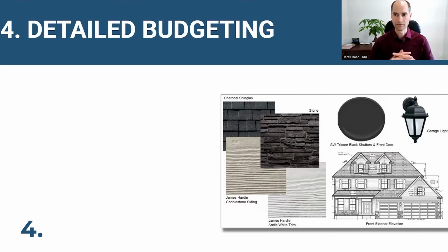So after you've completed the rough budget and provided that to the client, now they have a good idea and you've got past any sticker shock, any changes or things they may be asking for. You'll now move into the detailed budgeting. By the time you get to the detailed budgeting, this is where you definitely need a pre-construction service agreement in place so that you're getting paid for your time being put in. It'll take you hours to go through selections, changes, whatever else may go into the detailed budgeting process.